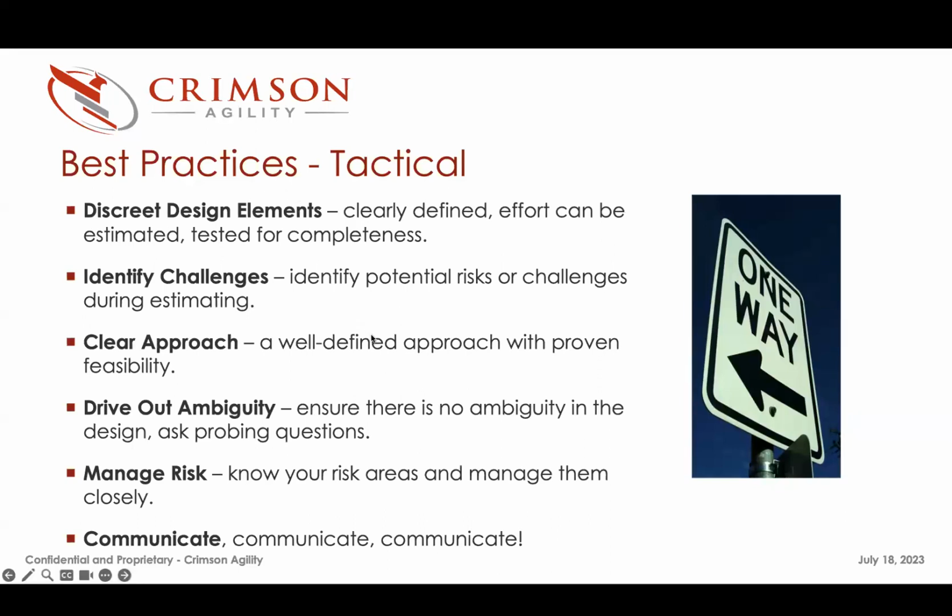Ensure there's a clear approach with proven feasibility when preparing estimates. If the approach is not well defined, find out what we need to better define it. Do we need more time for the estimate? Do we need some time for research? Find out what's needed to have high confidence in the approach and the estimate that we're providing.